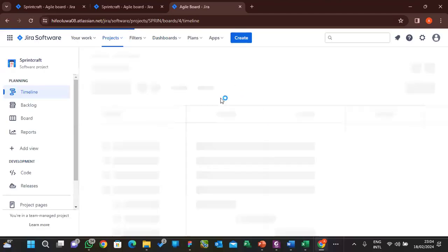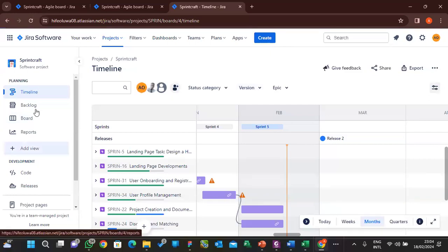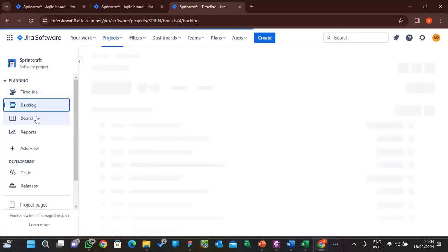But for me, what I know is that it's not. As I showed you from Jira, it is not the same, right? You use story points for complexity, and days and hours to estimate the workload. So if a developer tells you that you need 5 days, that means the workload is going to take him 5 days to deliver that task. Why he did not break that task down is because he's the only one involved in that task. I'm going back to that task now. I reopened the experience before.